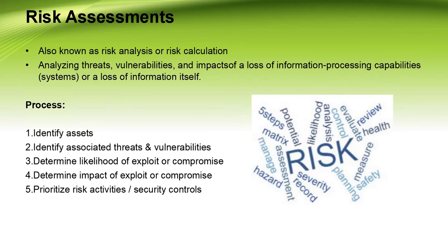So, having already performed a threat assessment and vulnerability assessment, you must consider the likelihood that the threat identified might actually occur. To most accurately estimate the probability of an event occurring, use a combination of estimation and historical data. Most risk analyses use a physical year to set a time limit of probability and confine proposed expenditure, budget, and depreciation.